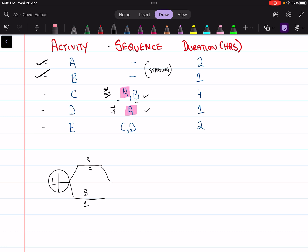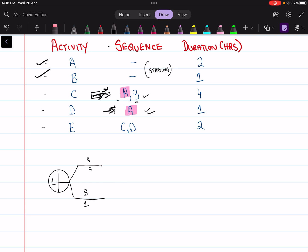If you were to start off with activity C directly, that would be incorrect because you'd have ended A and B together, and then activity D cannot start since it requires only A to be completed in isolation. So even if the sequence states two activities ending together, be cautious and first look at the activity required to end in isolation. Draw activity D first by making a separate node and writing its duration of 1.